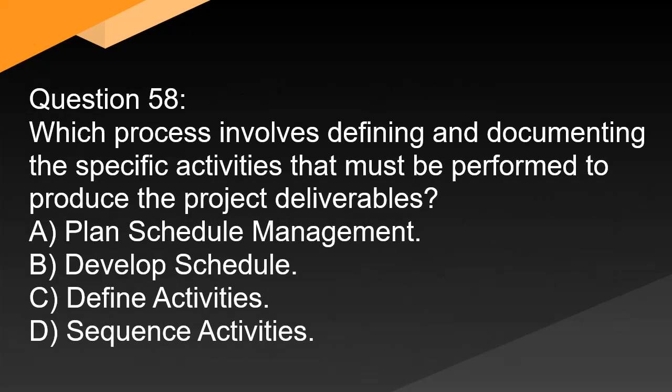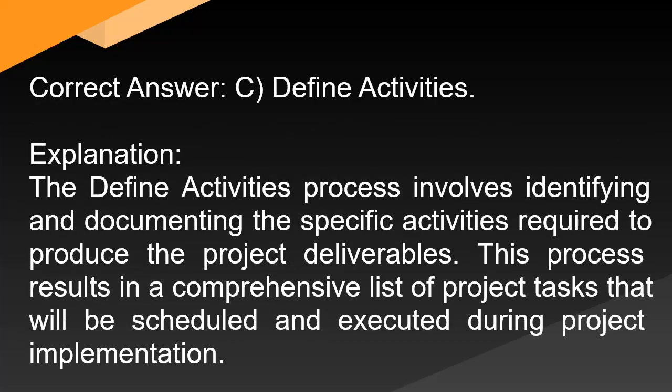Question 58: Which process involves defining and documenting the specific activities that must be performed to produce the project deliverables? A. Plan schedule management. B. Develop schedule. C. Define activities. D. Sequence activities. Correct answer: C. Define activities. Explanation: The define activities process involves identifying and documenting the specific activities required to produce the project deliverables. This process results in a comprehensive list of project tasks that will be scheduled and executed during project implementation.